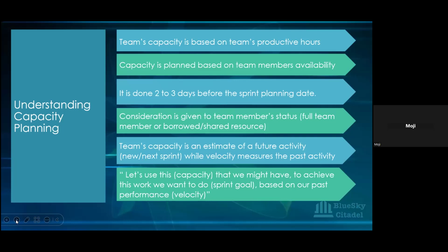If I'm not there for 10 days, if I'm taking 1 day off, you can't count that 1 day I'm taking off and plan on it. You have to remove that from whatever plan you're doing. And you will see that when we get to practically calculating the team's capacity that we have in place.